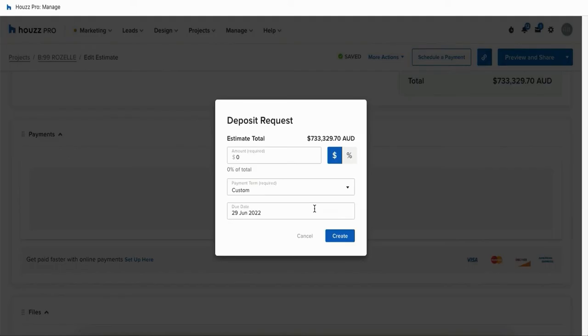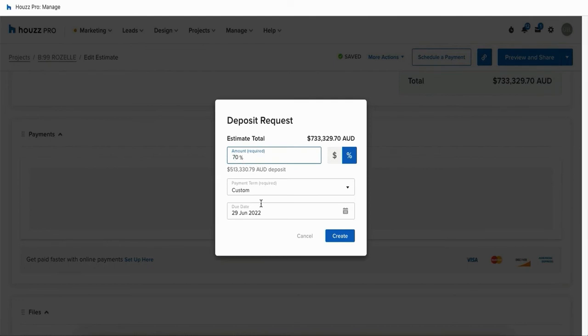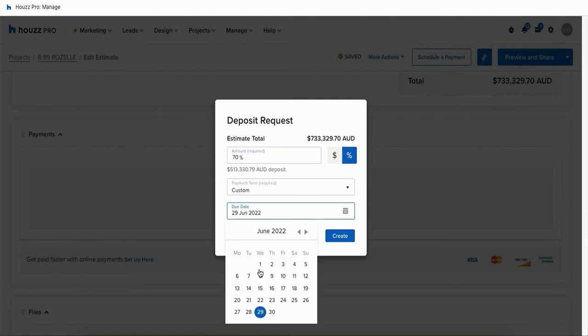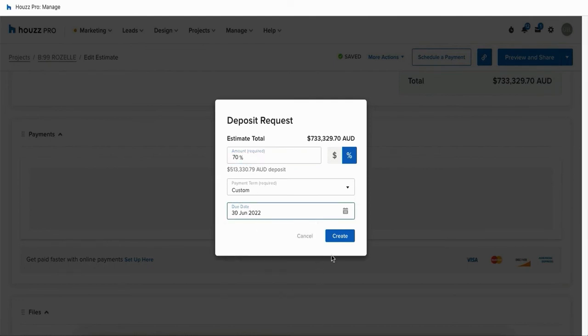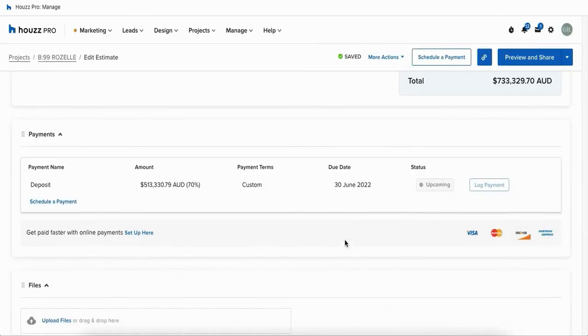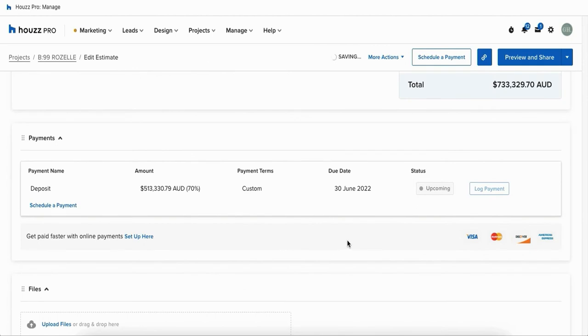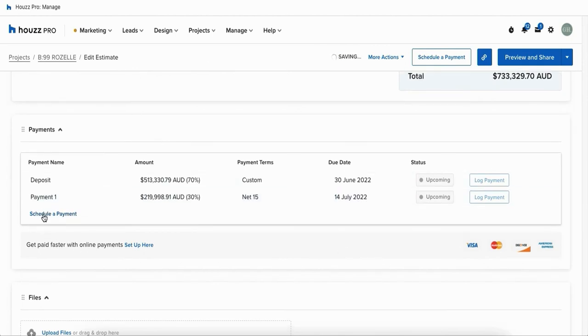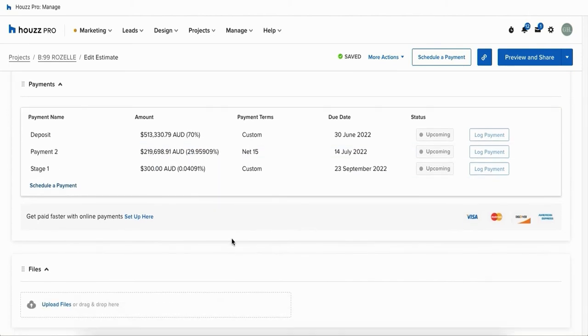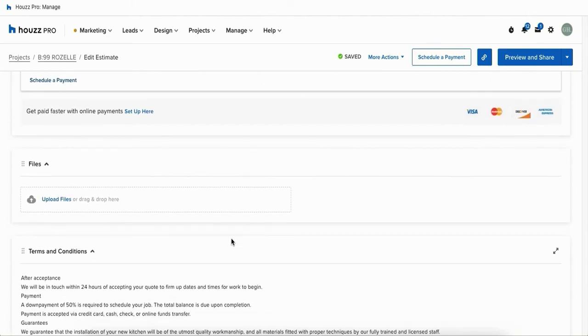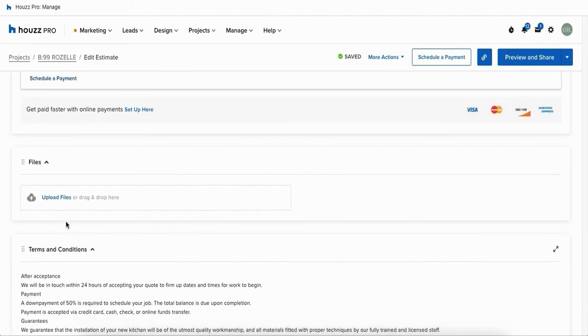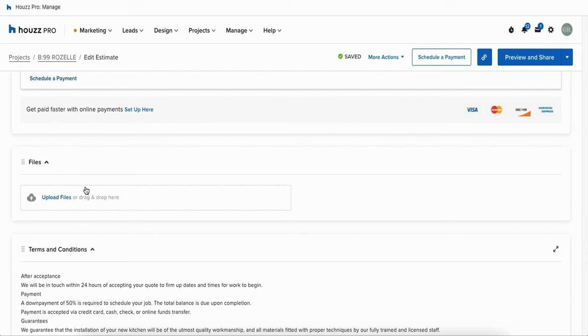Below our line items we've got our payment schedules so you can come in here and request multiple payment schedules for your document. You can request a deposit of a certain amount being in dollar or even percentage and you can give it a custom due date as well. Once you create it it'll have a new payment schedule entered in here and you can create as many as you'd like for the remaining amount of your document.